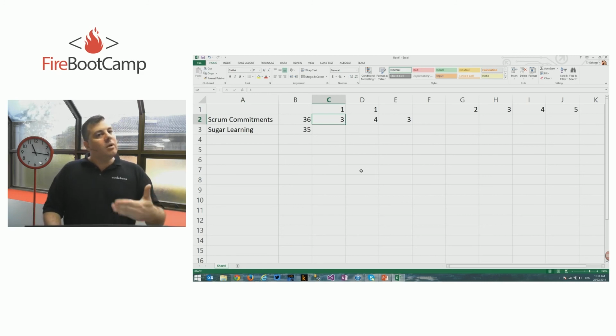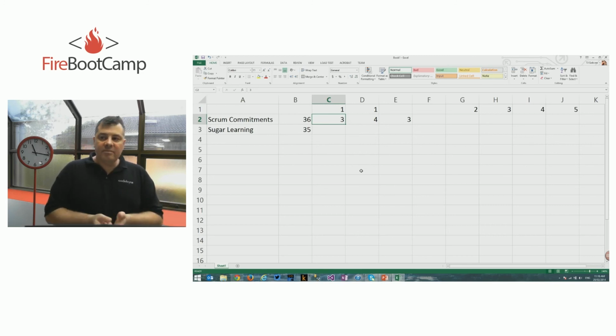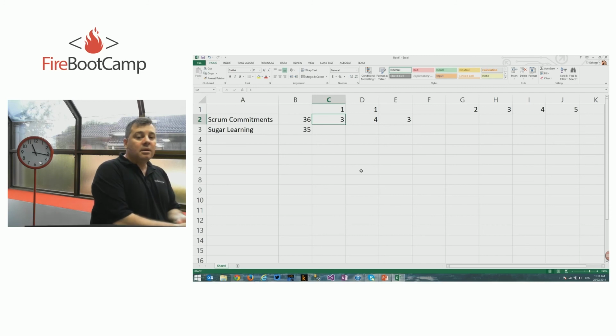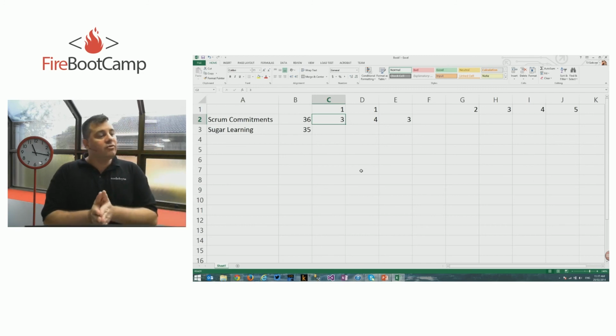Otherwise, I'm not going to be able to analyze this. So over the next couple weeks, you only have a couple iterations left, take a look at how many you committed to that week and how many you completed. That gives you a good rate of how efficient you are.